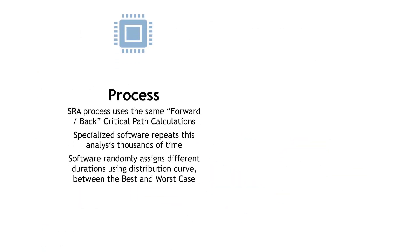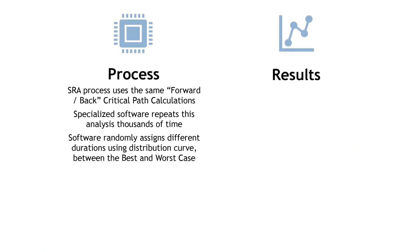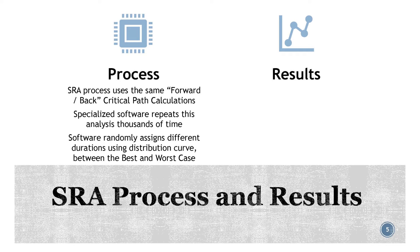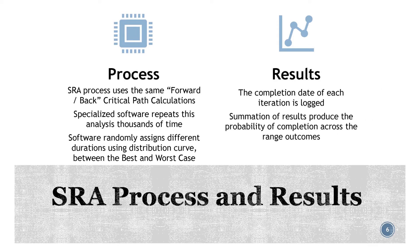The basic process for conducting an SRA is to first have a healthy integrated master schedule with a meaningful critical path. The SRA process uses the same logic network for its calculations, except instead of calculating a project duration based on a single set of dates, it repeats the forward and backward calculations hundreds or thousands of times. For each of these iterations, the software randomly assigns different activity durations between the best and worst cases based on the associated distribution curve. As a result, a completion date associated with each iteration is logged, and a summation of these results reports on the probability of achieving each date within the range of the total outcomes.